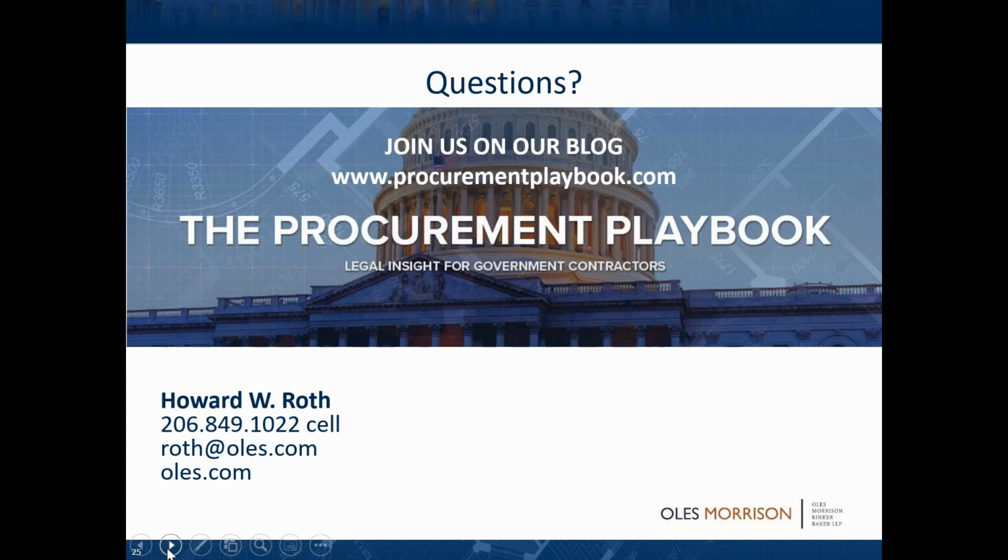Well, what generally happens is, once you have one or two constructive changes, and the government's telling you they're not going to pay you, then you realize that there's an issue, and you're going to have to put together an overarching REA. It's generally a good idea, if it's been 2 months and you've got 5 outstanding, to put them together as one. It tends to make more sense to put one big REA together, again without delaying the process so much that it's no longer timely. Correct. That's a good response.